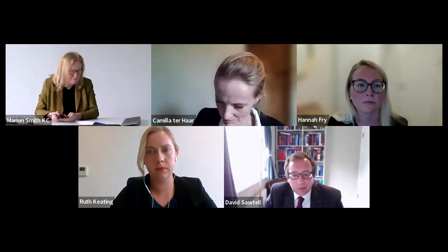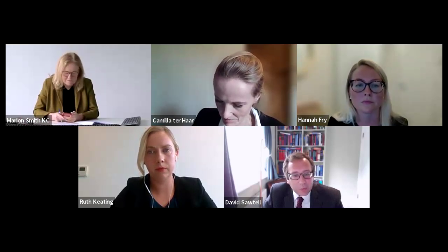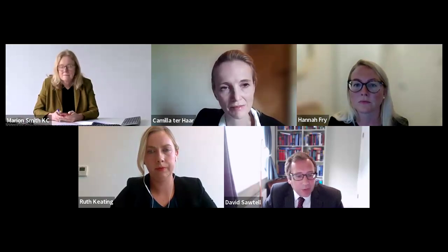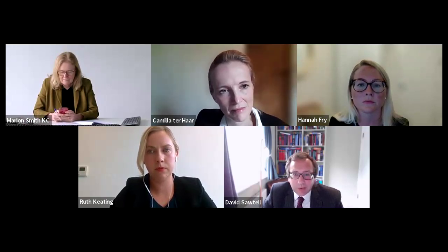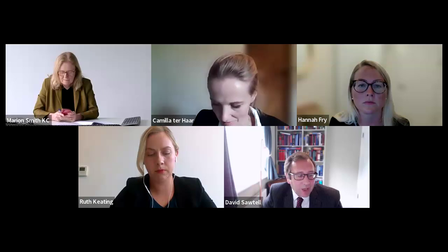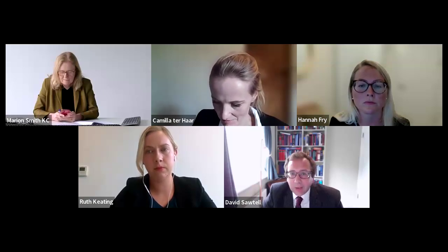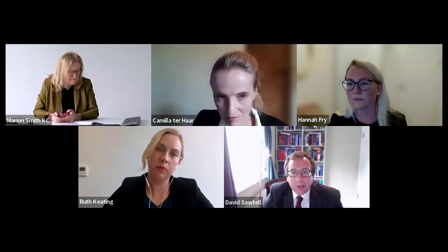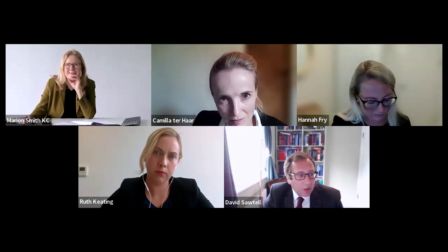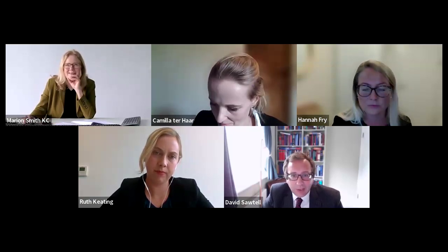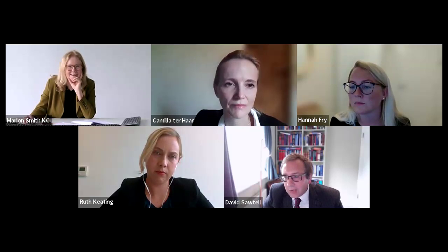It's required to give a notice forthwith if and whenever it becomes reasonably apparent that work is being or is likely to be delayed, and there's no express sanction if they don't provide a prompt notice. Now, compare that to what we've seen in the FIDIC family, in the NEC family. Now, I've had a look at the minor works form. That retains what I might politely call its own slimline procedure. I find it very difficult indeed to see what's happened there.